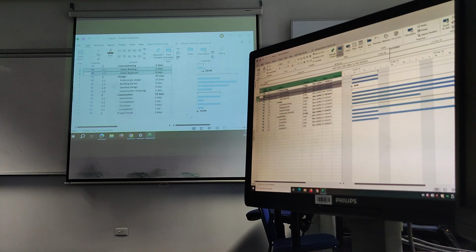Okay, so I'll show you again for the next one. The preliminary design, that's the predecessor. Finger on control, go to the successor, hit the link, and then it provides the link there. So when you've got ones like 3.2 where there's 3 or 4 different links in, more predecessors or successors, you just do each one at a time.